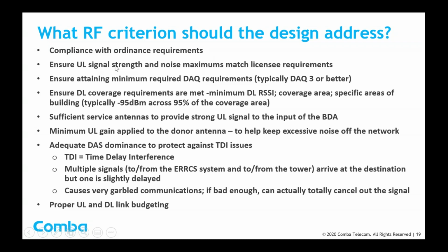The design should ensure that the uplink signal strength and noise maximums match what the licensee is requiring. It should ensure that you're attaining the minimum required DAQ. DAQ is delivered audio quality. Charlie talked about that in his presentation last week. Typically, ordinances want a DAQ of 3 or better.